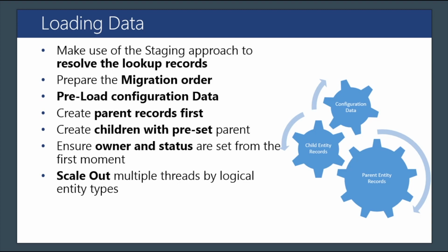Accounts, as an example: you need to migrate accounts first, and then you have several contacts that are linked to these accounts, and you need to make sure that you're preparing the migration order for those different data sets in order to achieve the desired outcome of your migration.